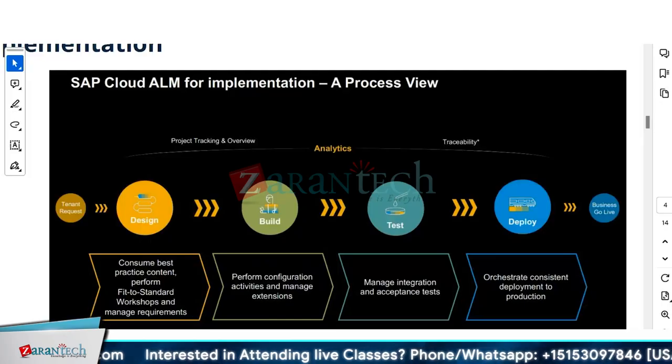So these are also now part of the build phase. When we plan, we have to make sure that there's a development piece for S4HANA, but the whole process is end to end, where S4HANA is going to integrate with your Ariba or your SuccessFactors, Concur, Express, anything, right? You have to take that whole end-to-end process into consideration when you are giving an estimate and when you're even going for your workshops and requirements, right?